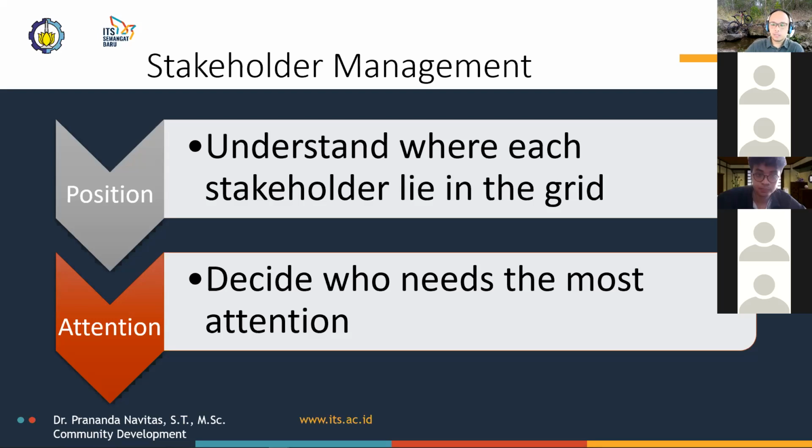Stakeholders with neither power nor interest would go in the lower left-hand corner of the lower left quadrant. Those with a reasonable amount of power and interest would go in the middle of the upper right quadrant, etc. Eventually, the grid will be filled in with the names of stakeholders occupying various places in each quadrant, corresponding to the level of power and interest.